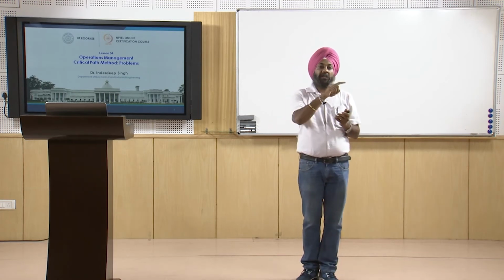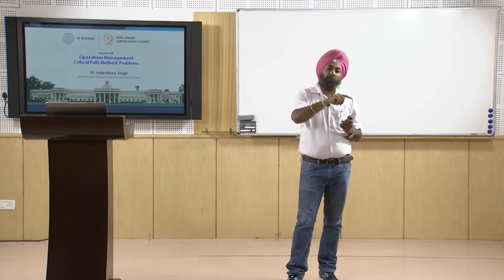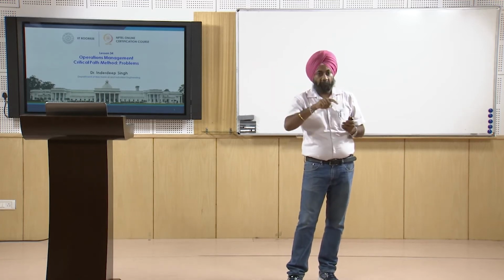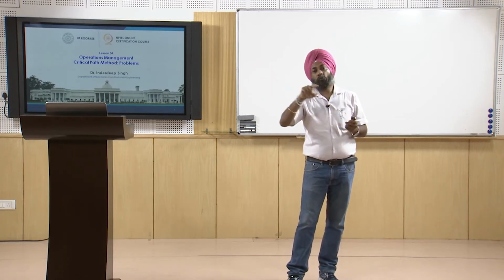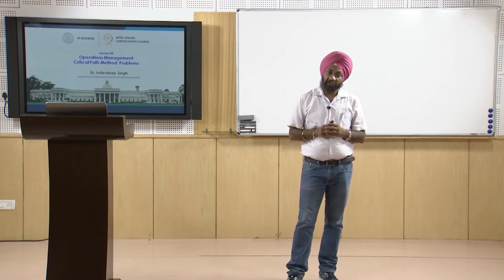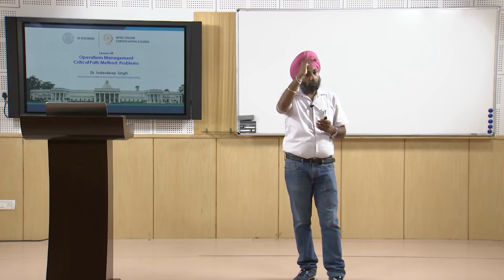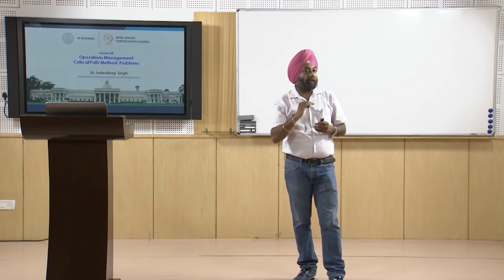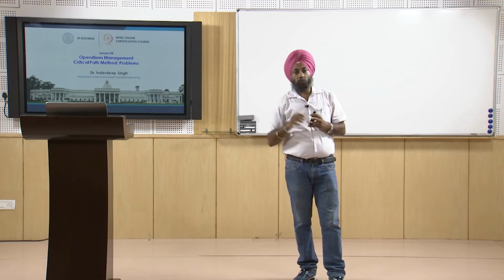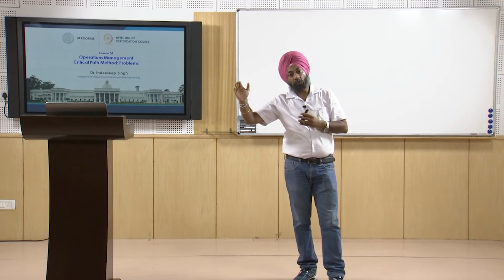So we can say A, B, D, F is one path in the network, or 1, 2, 5, 7, numbering the nodes. 1, 2, 5, 7 represents the activities on the critical path. So we can represent the critical path in any way. What we have to do is list down all the possible paths of reaching the end node starting from the starting node. So suppose our starting node is 1 and our last node is 10.